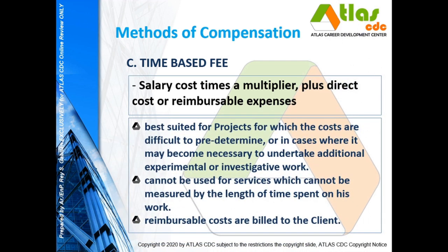So this is best suited for projects for which the costs are difficult to predetermine, or in cases where it may become necessary to undertake additional experimental or investigative work. And this method cannot be used for services which cannot be measured by the length of time spent on his work.